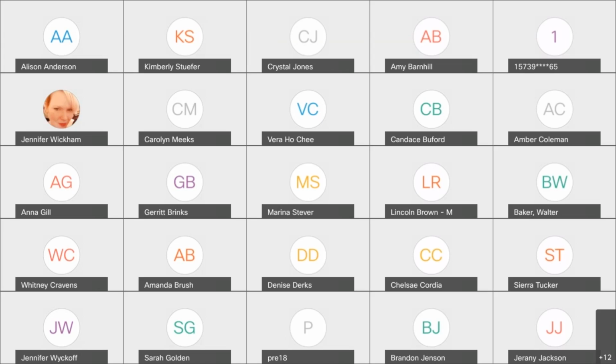Do you want to ask your other question while you're unmuted, Lincoln, or do you want me to read it from the chat? Oh, I think this is kind of related to somebody else's question about what the environmental covers. It was my understanding that it covers all aspects of a project, whether, if CDBG money is involved in just a portion of it, the environmental needs to cover all components of it, even if there are parts of it that are privately funded. But that was my understanding. Yeah, the project description includes all funding sources. Thank you.